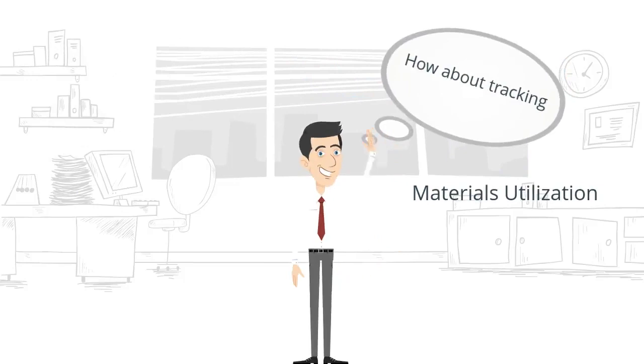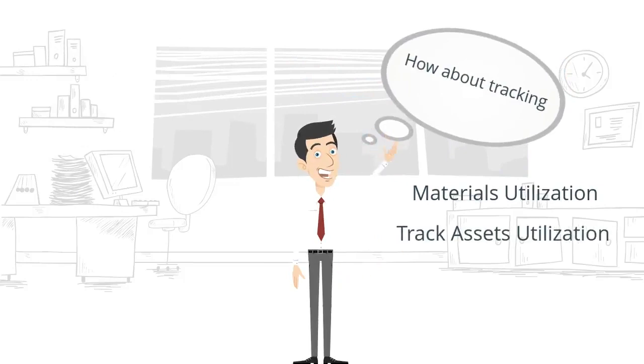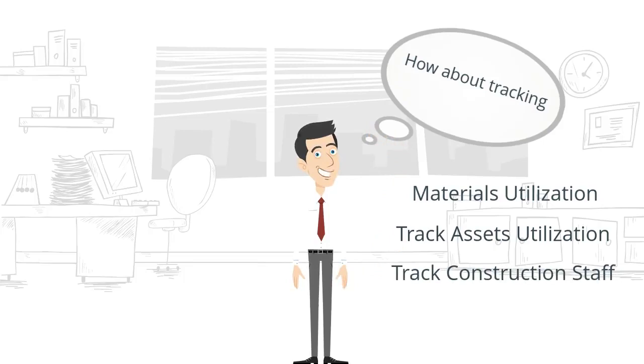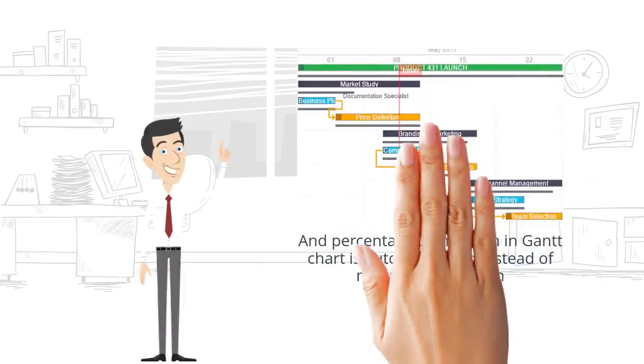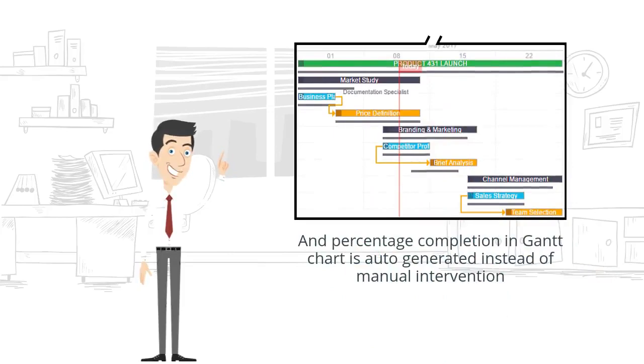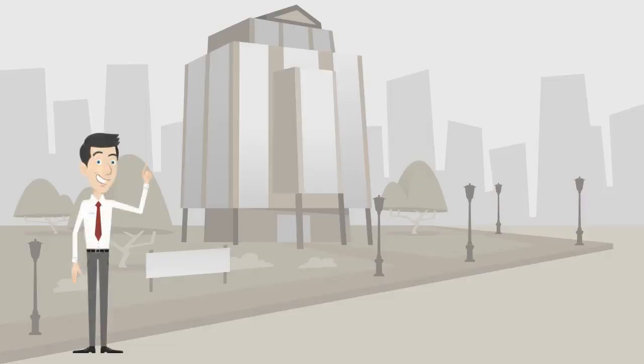Track assets utilization and track construction staff, and percentage completion in Gantt chart is auto-generated instead of manual intervention.